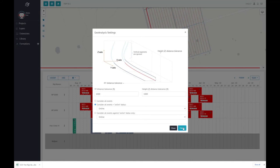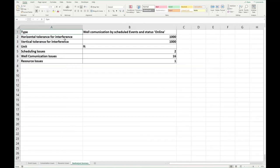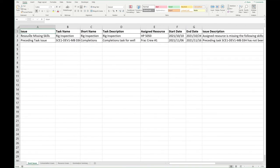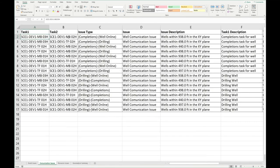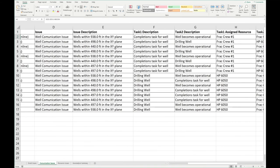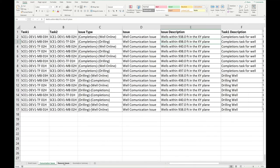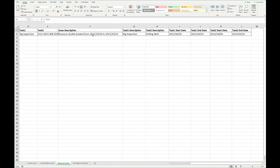An Excel will be generated where you can view your results once you've hit the check button. View the Geoanalysis Summary page for a quick look at your issues. See if an event has task conflicts, such as starting to drill without permit approval, or starting completion on a well that hasn't finished drilling. View the details of any collision issues in your scenario from your chosen distance tolerance. Find out if there are any resources double booked, and make adjustments accordingly.